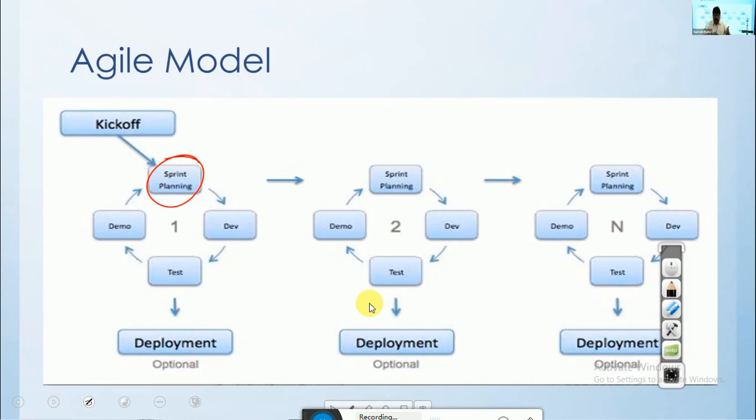Here it is almost a kind of user acceptance testing. I am demonstrating, client is listening, viewing. Now client gives 1 or 2 comments. This color is too bright. Why can't you make it a little lighter? This Facebook link and Twitter link are at the bottom of the window. Why can't we move them to the right side of the window? Okay, sir, no issue. Monday, rework. By Monday evening, again I submit. Client said okay, keep it aside. Plan next sprint, next 2-3 functionalities for the next schedule. Like this, continuously multiple sprints will run.